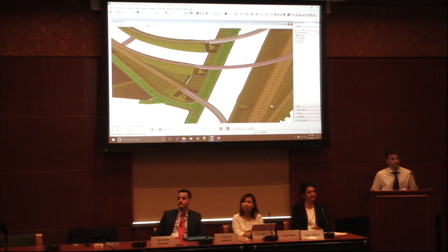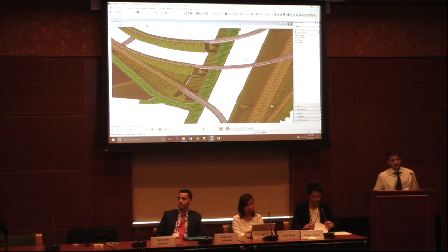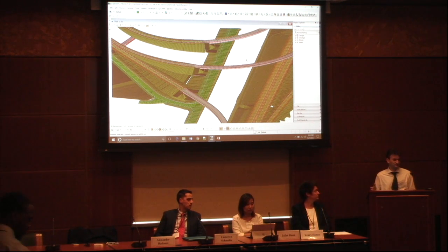Any other questions? I was just going to ask, have you done any quantification of the time saving and all those criteria you established to compare the traditional template-based model with this 3D linear approach that you call it? Not a formalized study, but proof of concept by the fact that we managed to save a few million dollars in budget, because the budget originally was catered for 50,000 hours of creating cross sections.